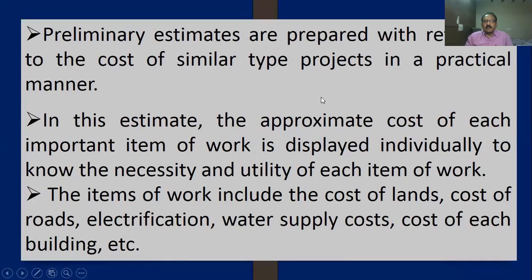Preliminary estimates are prepared with reference to the cost of similar types of projects in a practical manner, just like schools, colleges, buildings, or double room buildings nowadays. In this estimate, the approximate cost of each important item of work is displayed individually, with the necessity and utility of each item of work.